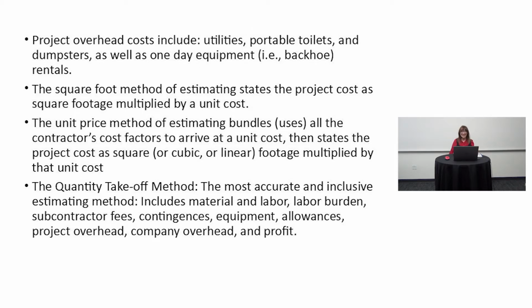Next one. The square foot method of estimating states the project cost as the total square footage multiplied by a unit cost. And that unit cost is determined by your idea of the marketplace, of the competition. A unit cost. That is the square foot method, the most common estimating method out there.